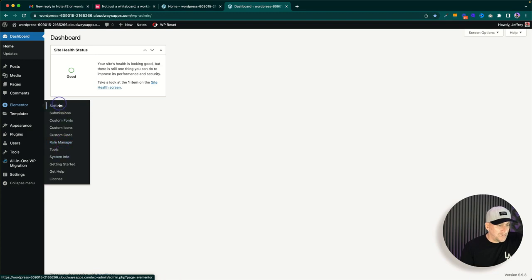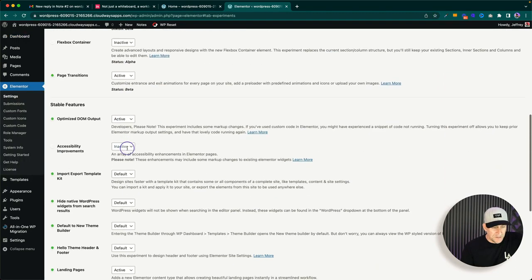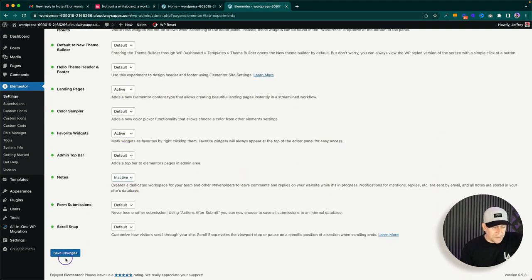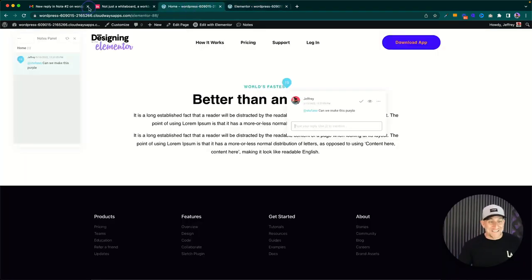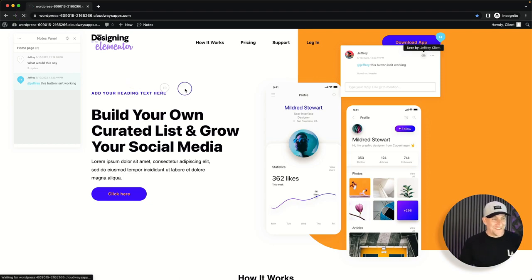Design is subjective and you can fall into a trap of perfectionism. Make sure you define the process before starting. Here's something really important: go back to Elementor settings, Experiments, and Notes — I would turn this off after the revision window is complete. That way the client can't keep adding notes endlessly. Open up set windows of time for Notes; don't leave it open all the time. I learned this from my design process with InVision — set a number of rounds per page, define a time window, and finalize feedback as quickly as possible.